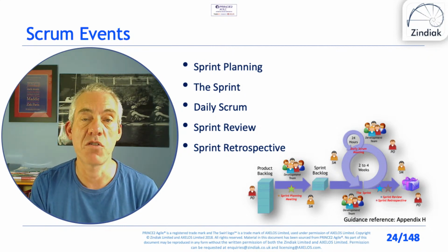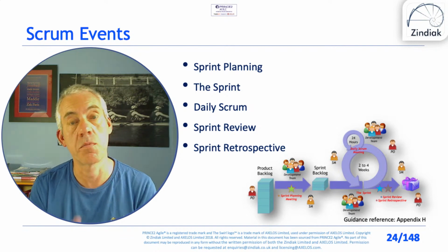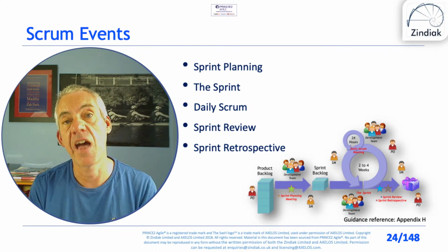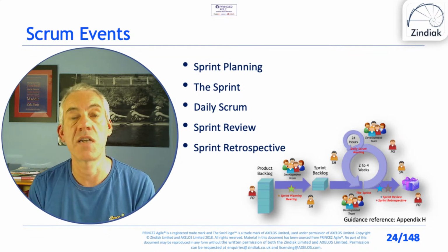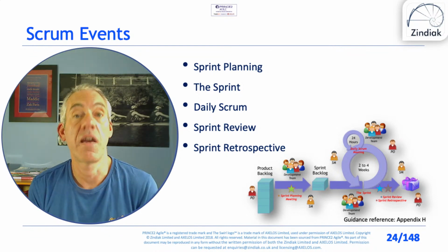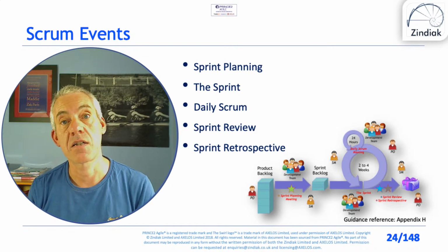In the sprint retrospective, it's just the Scrum team, no one from outside the Scrum team, and they're looking at their own efficiency and effectiveness and the tools and techniques and behaviour on the team to try and improve it for the next sprint.